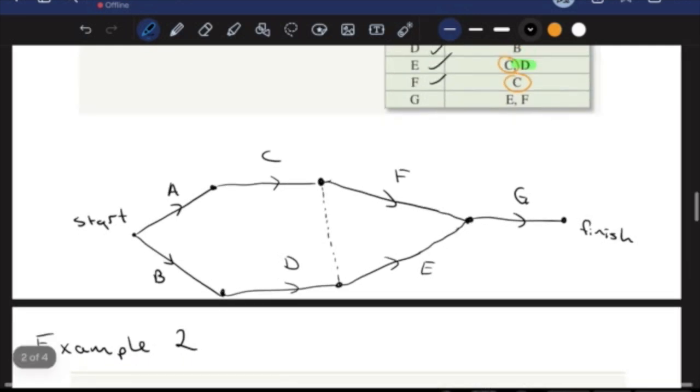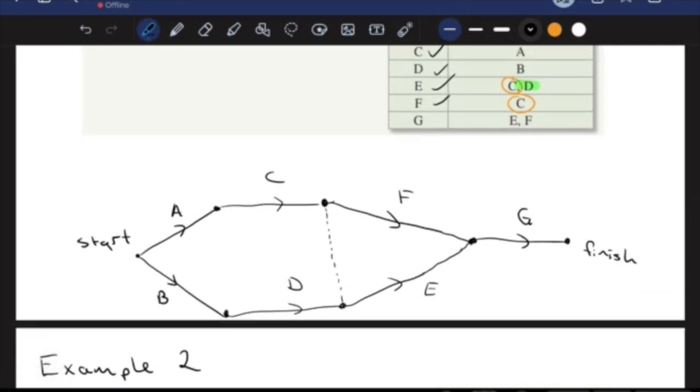Now, it might be a little bit weird to think of, but adding this dummy activity makes the flow of our network diagram work. It addresses this discrepancy of having one thing in common but the other thing not. It shows the flow of activities where we can get to E, but showing immediate predecessors of C and D. And what makes this possible is our dummy activity on our network diagram.